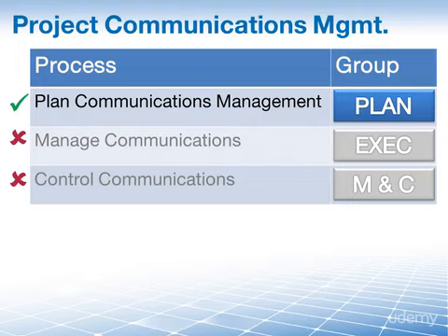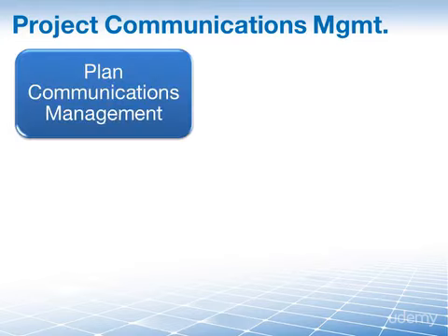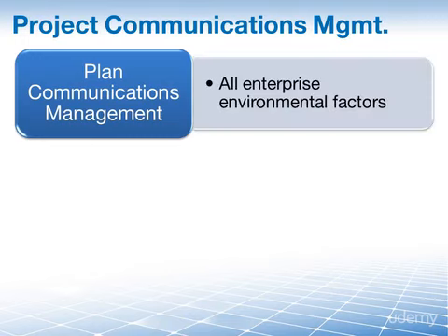There is something very surprising about the EEFs in our first process here, Plan Communications Management, because according to the PMBOK guide, we have to take every single enterprise environmental factor that may exist into consideration. So 100%, everything that influences our project internally and externally has to be used here.